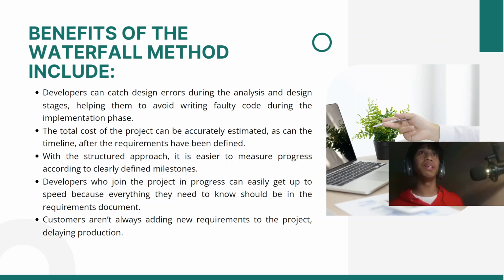So, what are the benefits of the waterfall method? First, developers can catch design errors during the analysis and design stages, which helps them avoid writing faulty code during the implementation phase. The second is the total cost of the project can be accurately estimated, as can the timeline, after the requirements have been defined.